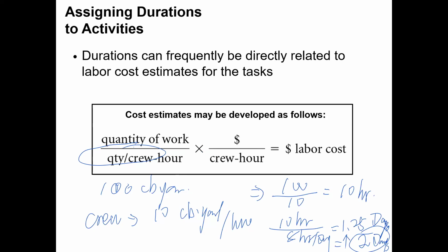So that is something kind of interchangeable over here. Say your budget is $200 for this work, and you hire a crew with an excavator that costs $100 per hour. That means you have 2 crew hours here, right? 2 crew hours divided by 8, you get a 0.something. You still have 1 day to do it. That makes sense?